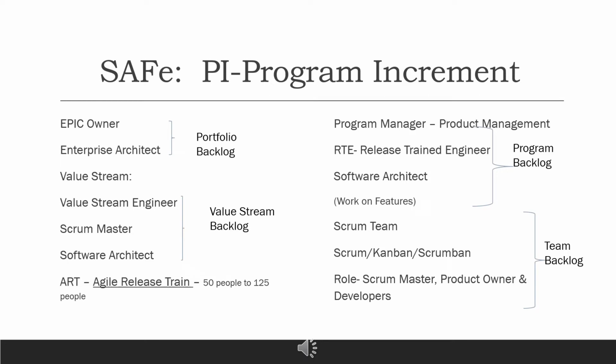So in Scrum, and when we have a combination of project and DevOps, actually we see that Scrumban follows the framework. The development team will use a board, in Microsoft Azure DevOps or Jira, the Scrum board, right? So that is where your Scrum development team will work. And you have a production support team, and there they use the Kanban board. In a team where we work with the combination, the development team is on a Scrum board and the production support team on a Kanban board. So all together the framework is called Scrumban.